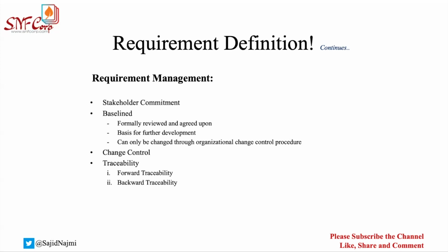What is the impact on the applications, different LOBs, different teams, or your internal development work that you have already completed? You will come up with a detailed report, and then you will share it with the business. That report may also include a high-level budget, the high-level timeline that you might need, and all those impacted areas, so that the business will be aware of the changes. And then once the business approves it, this will go through the change management process.